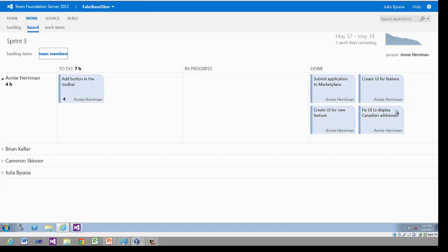And you're like, okay, so what do we do? I don't think we break it down into high level items. And we use the t-shirt size model. So small, medium, large, extra large, and you decide on it. So I throw a feature, my team does it. If that doesn't fit, that tells me as a scrum master or the project leader that it wasn't granular.